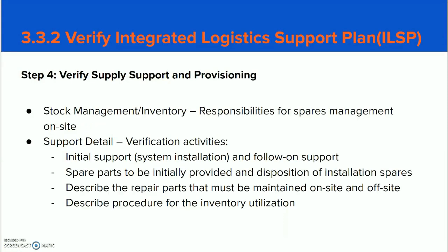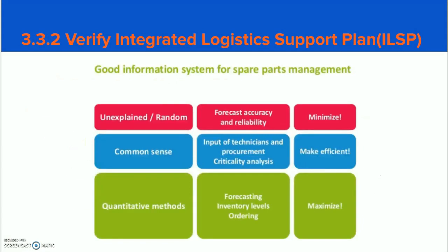Step 4. Verify supply support and provisioning. This includes verification activities for initial installation, repair parts on site and off-site, and procedures for inventory utilization. This is a simple explanation of how spare management will be prioritized. If there is no explanation for the use of the spares, then we will minimize their use. If it is common sense based on the input of the technicians, then we will consider a moderate use of the spares. And if by the use of quantitative methods and based on forecasting, it is reasonable to supply more spare parts, then they will be supplied.